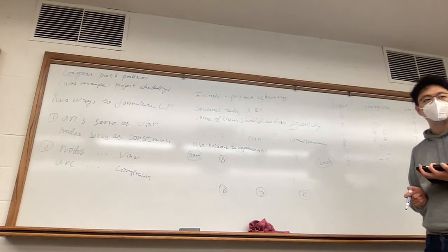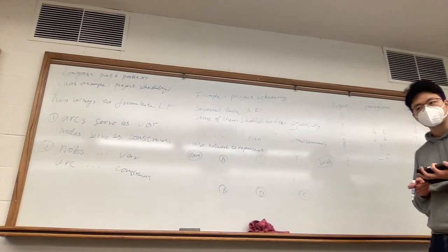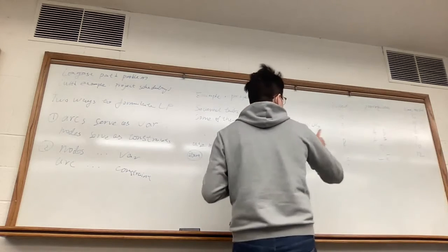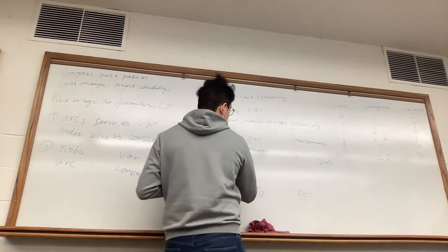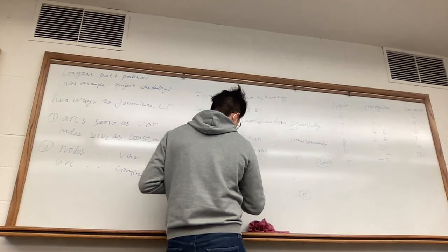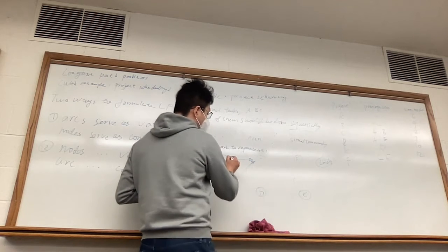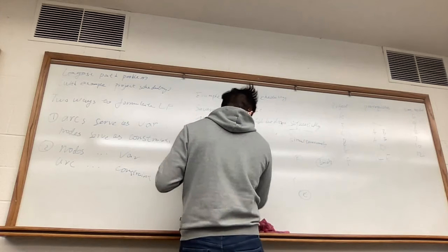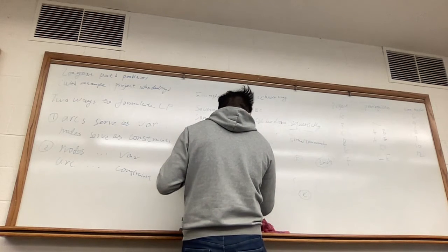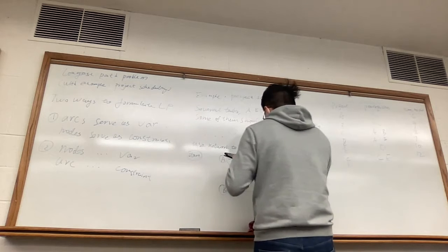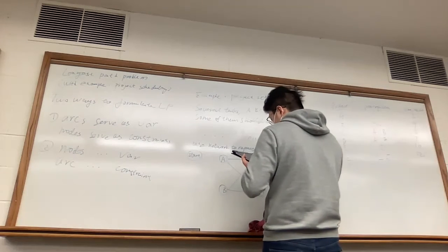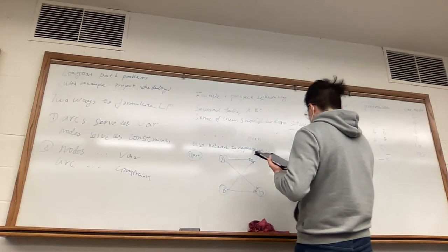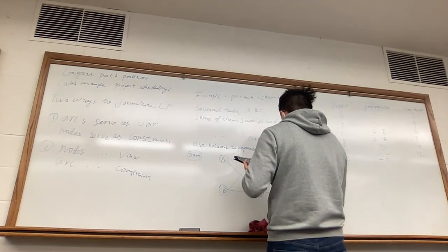But an arc from the prerequisite to the course that it's a prerequisite for. Yeah, very correct. So we see that project C has prerequisites A, B. That's to say, we use these two arcs pointing from A to C, B to C. These are the prerequisites. So let me complete. D requires A, B as prerequisite. F requires C. And F also requires E. And E requires D.